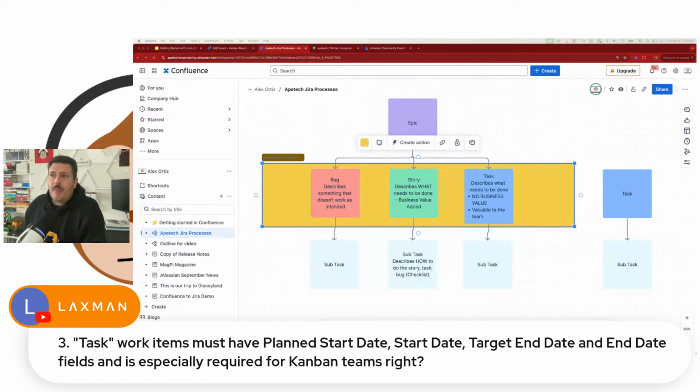So I like to manage expectations in Kanban by putting like a fixed version so that you at least have the end date, or when the bigger end date is going to be. But a lot of teams don't really like putting in these committed dates. And I would say trust your team first, but if your team can't deliver on their commitments, before you go to micromanage by adding all these date fields, I would have the bigger conversation as to why are they missing their dates?